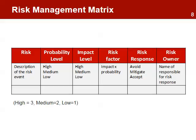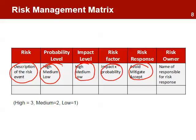The risk management matrix is a simple table to organize all risks and their levels of probability and impact. The table contains the following columns: description of the risk, the level of probability, and impact levels. The risk response strategy, which is based on the risk factor, and the risk owner, who is the person responsible for the actions required to respond to the risk event.